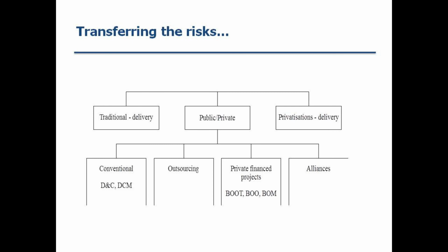Transferring risks through modelled contracts such as BOOT, public-private partnerships, build, own, operate, transfer, are often a good vehicle for transferring the risk, as we've spoken about previously, with time, with quality, with financing, and at the same time there's long-term private ownership and obligations associated with these types of contracts too. In most cases, the government will use these types of delivery contract vehicles, and it removes the government from a lot of the risks associated with financing, operating, building an asset.